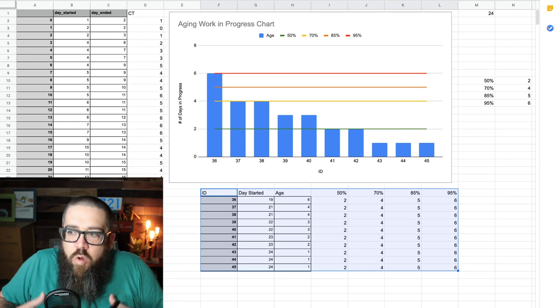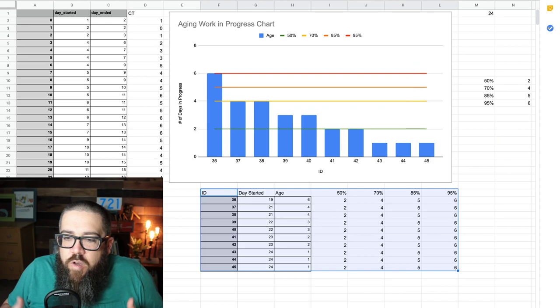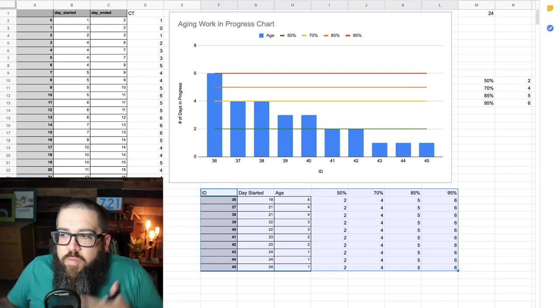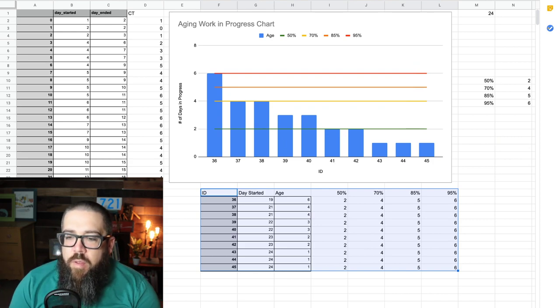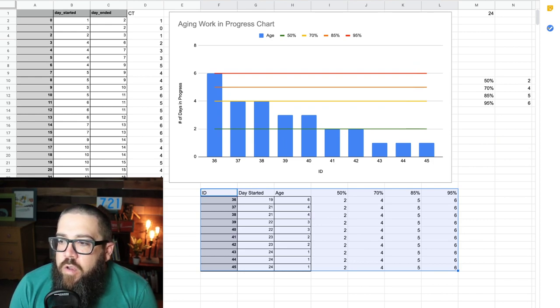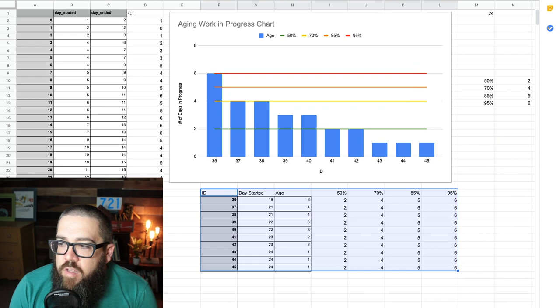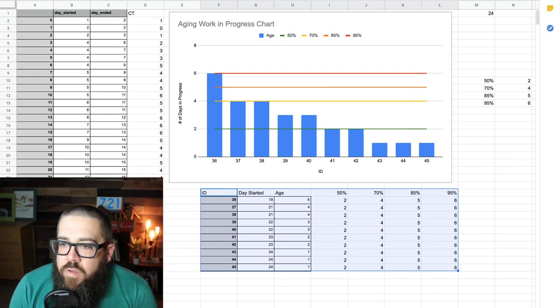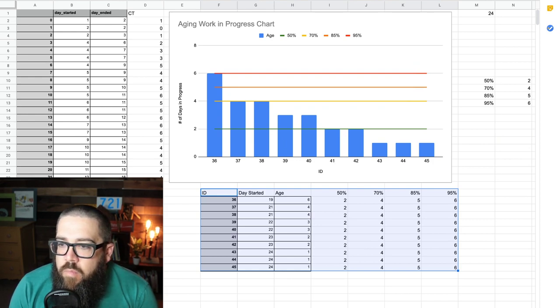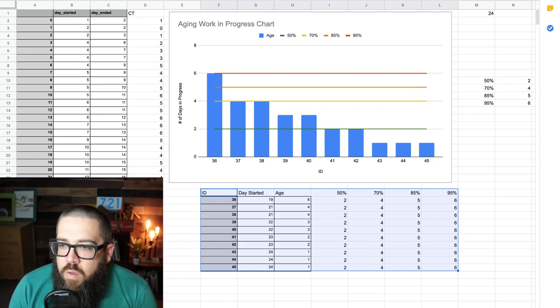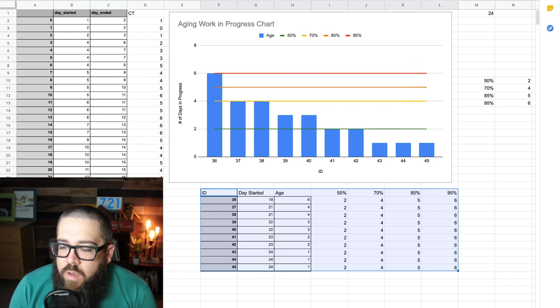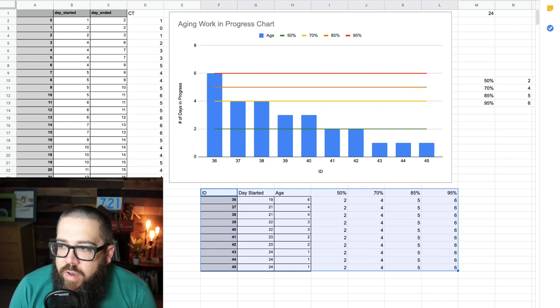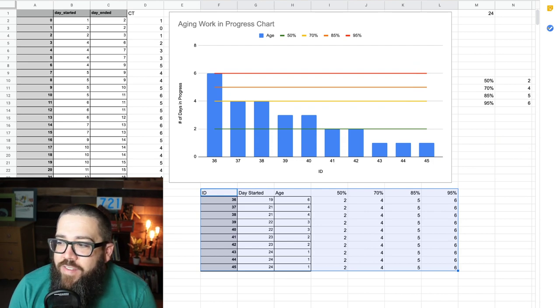So, that's where it gets cool. That red bar is like, hey, not only is it taking long, you're in what I like to call no man's land. And I got that idea from Daniel Vacanti. You've never been here before. So, it's cause for concern. We don't know when, it's hard at this point to decide if we're even going to be able to finish this. So, we need to stop what's going on.